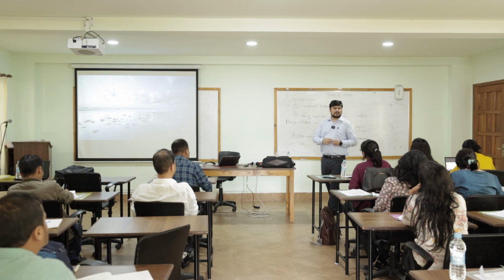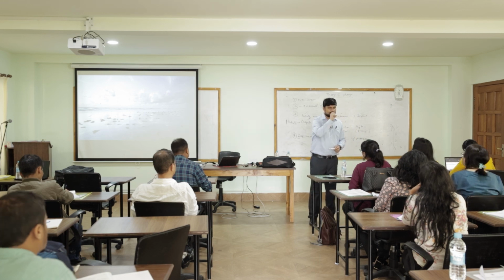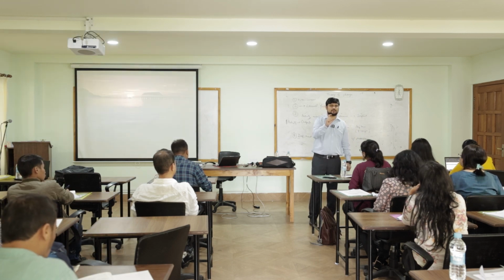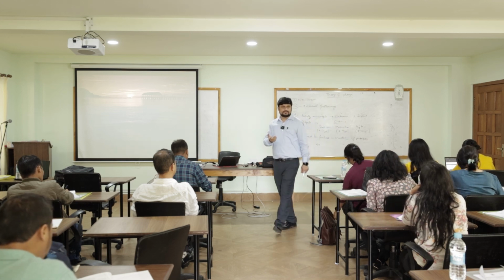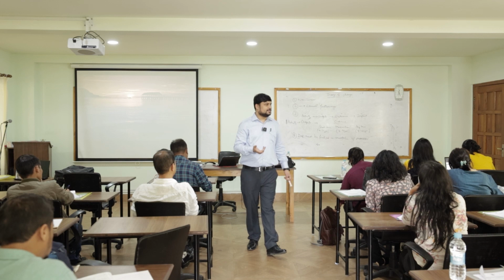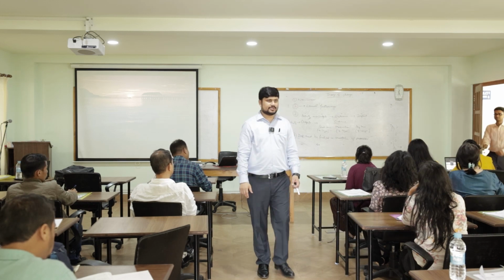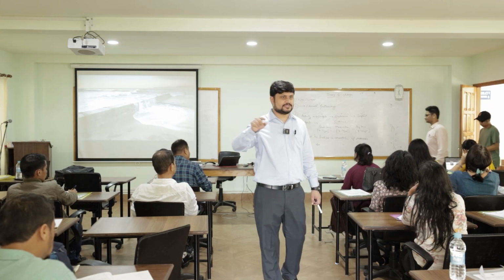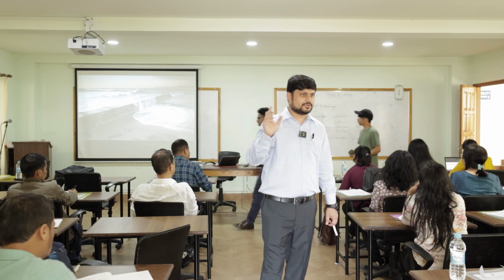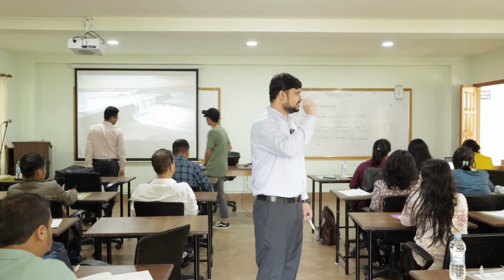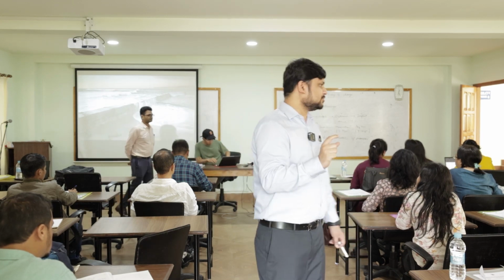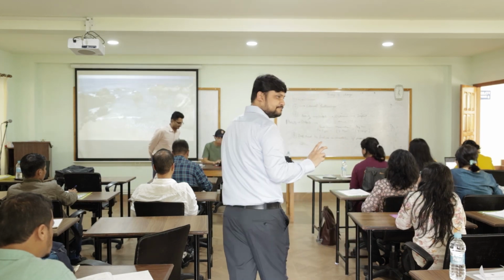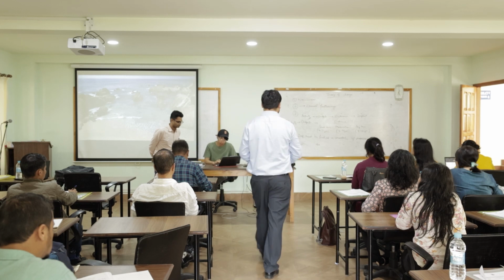We've also talked about how each of these statements that we are putting in the different boxes can be converted into indicators. If you simply write percentages or X number or whatever, it becomes an indicator. If you mention the number or the percentage, that 20% should get this or 40% should get this, then it becomes a target. Right?